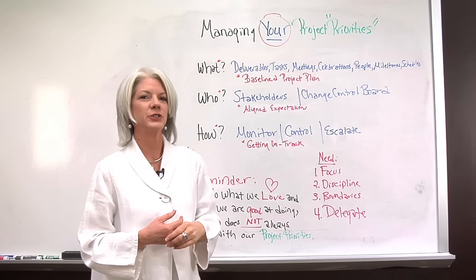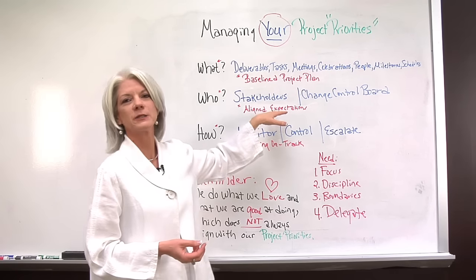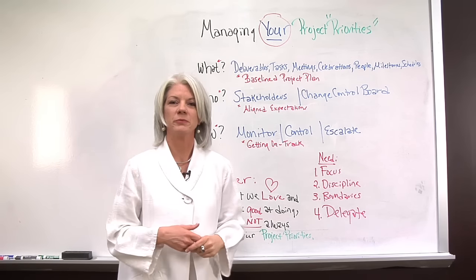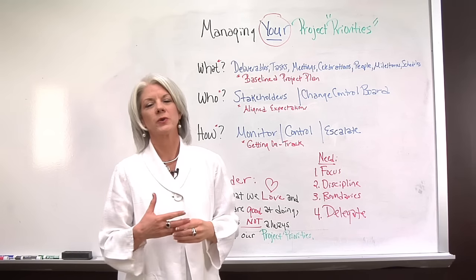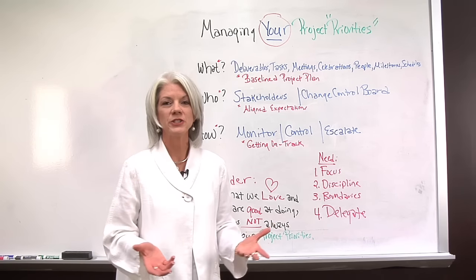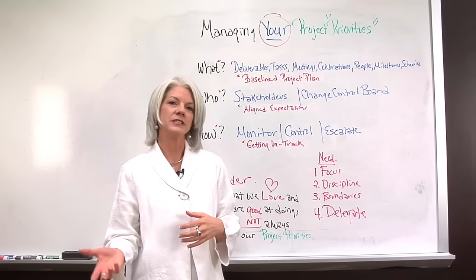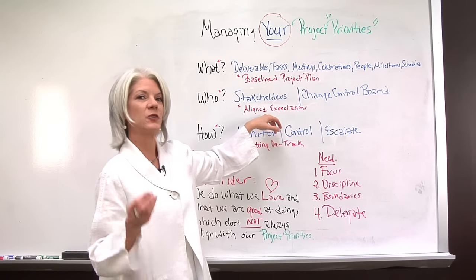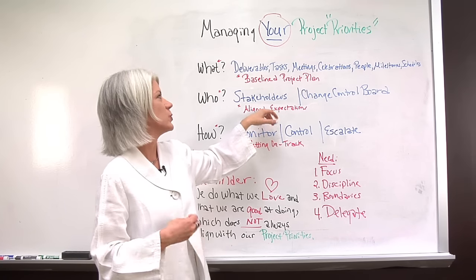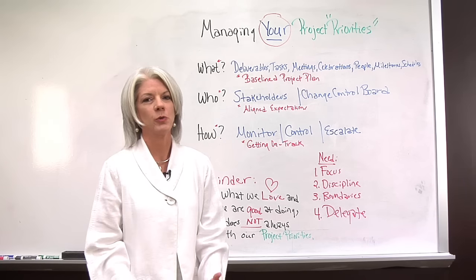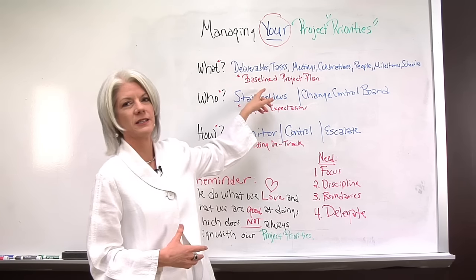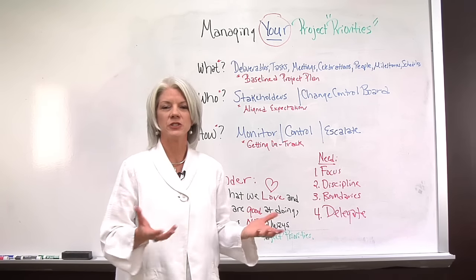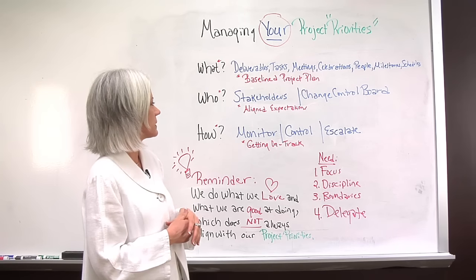It's important to ensure that their expectations are aligned to the project plan throughout the project, because throughout the course of the project, expectations and assumptions start being made as things change. Different expectations start changing, and we as the project manager have to work with the stakeholders and the change control board to make sure all of it remains aligned with the baseline project plan, or we work with them to change things, make decisions, and agree upon and re-baseline the project plan.